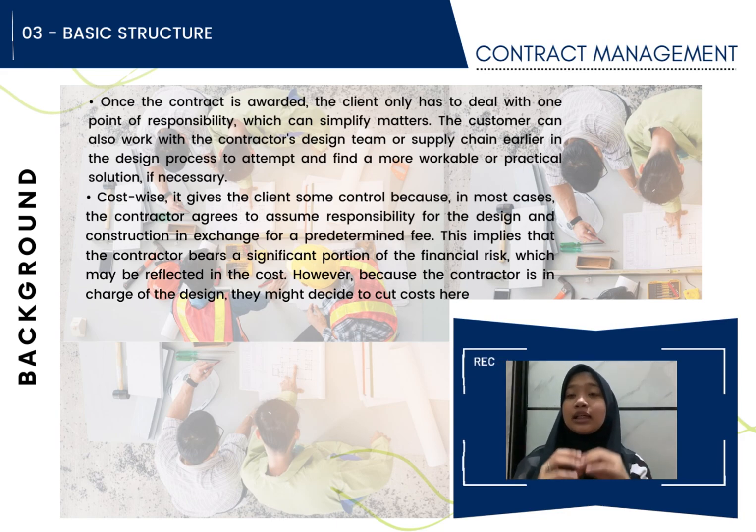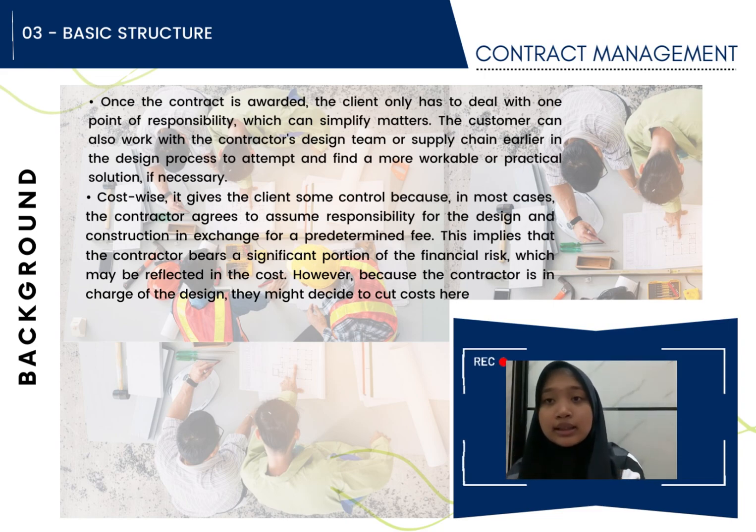Cost-wise, it gives the client some control because in most cases, the contractor agrees to assume responsibility for the design and construction in exchange for a predetermined fee. This implies that the contractor bears a significant portion of the financial risk, which may be reflected in the cost. However, the contractor is in charge of the design. They might decide to cut the cost here.